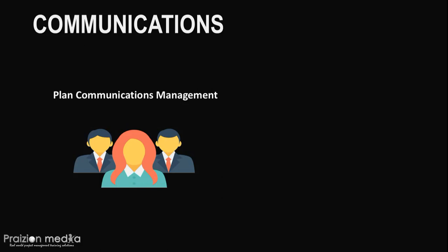But, let me say that this particular formula is not always delivered in questions as a straight application. In order to do well, you need to remember that the project manager sometimes may or may not be included in the question. If you're given a question that says, on a team of 5, how many channels of communication are there? It's obvious that everyone has been counted. But, if you have a question that states, a project manager with a team of 5 is communicating, then you know the project manager has not been counted, and therefore, n will be 6.